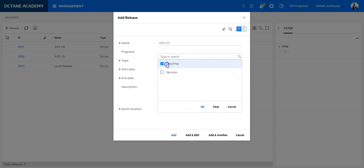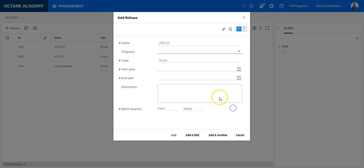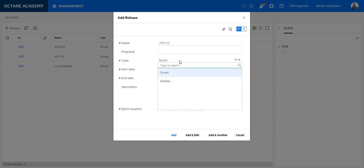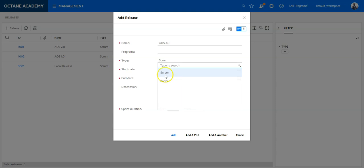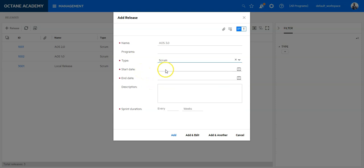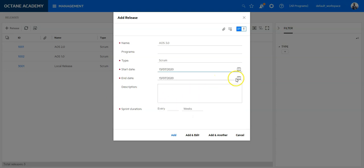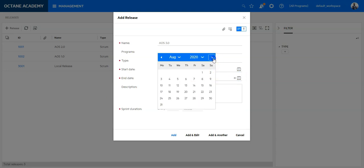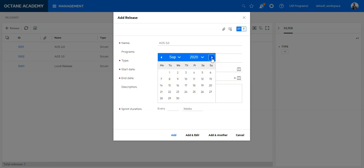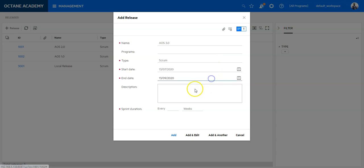I can select those programs directly and choose what type of release it is. We offer two types: Scrum and Kanban. If you want to create a release which is more traditional, create a Scrum release and change later on the size and dates of the sprints. Kanban release is just a flat release with a start and due date. Provide a start date when this release should be started—let's say it will start next week—and an end date, let's say September 13th.